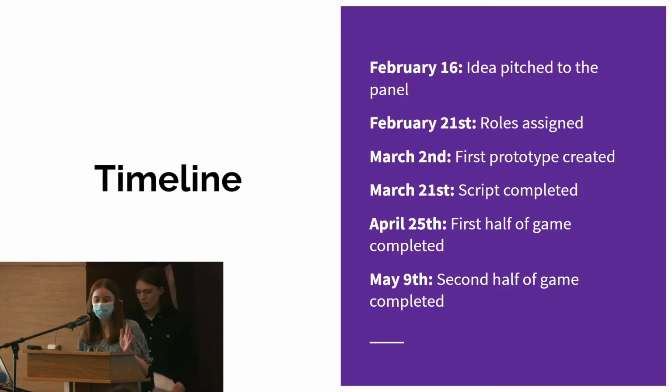By then we were able to really start creating the game, putting everything together once I got that script done. And by April 25th, the first half of the game was completed. Then we tested it out, we saw if there were any bugs. And then we eventually did the second half of the game, and that was finished May 9th. I'm going to pass the clicker off to Liam Heatherly, and he will talk about his part.